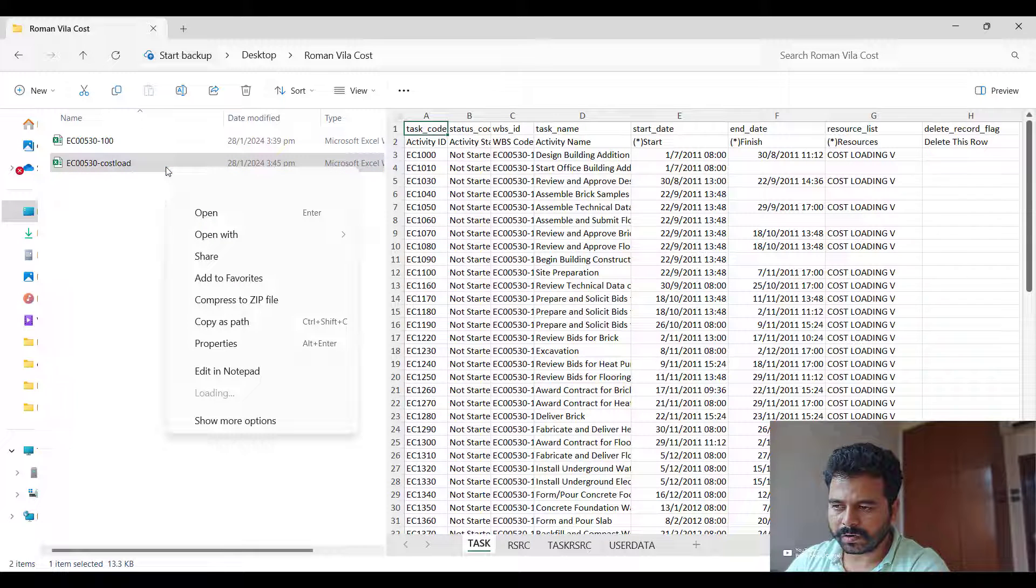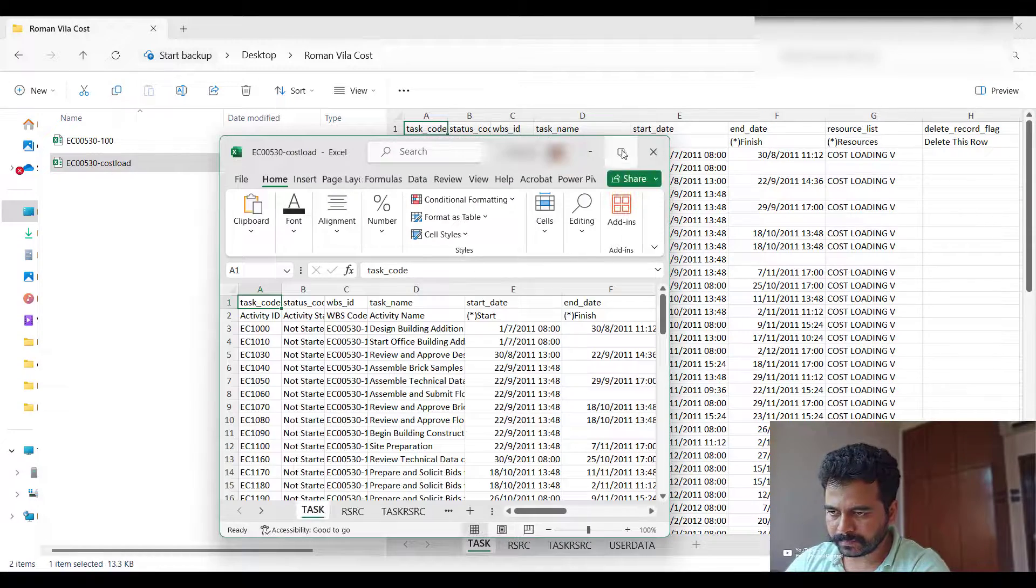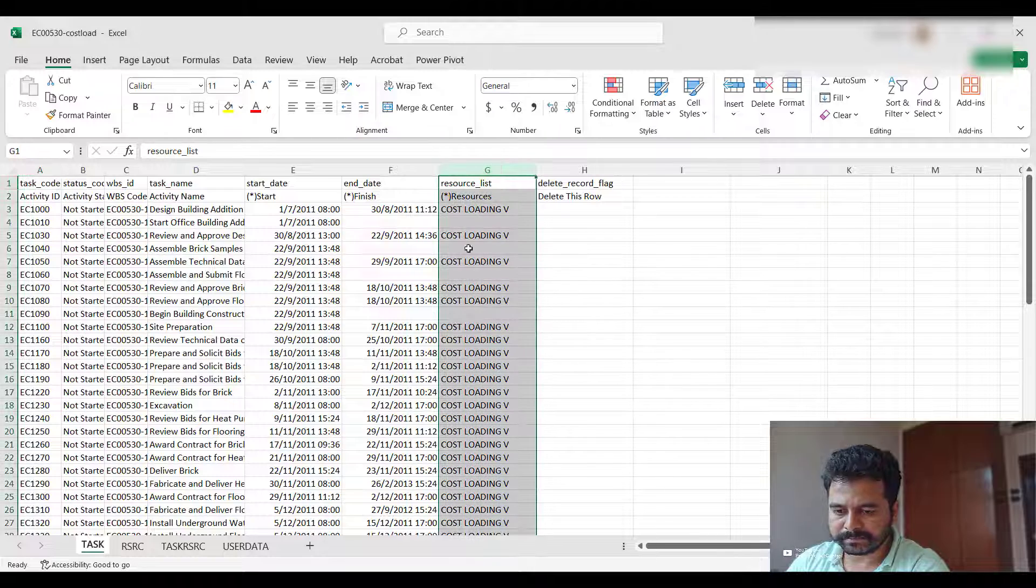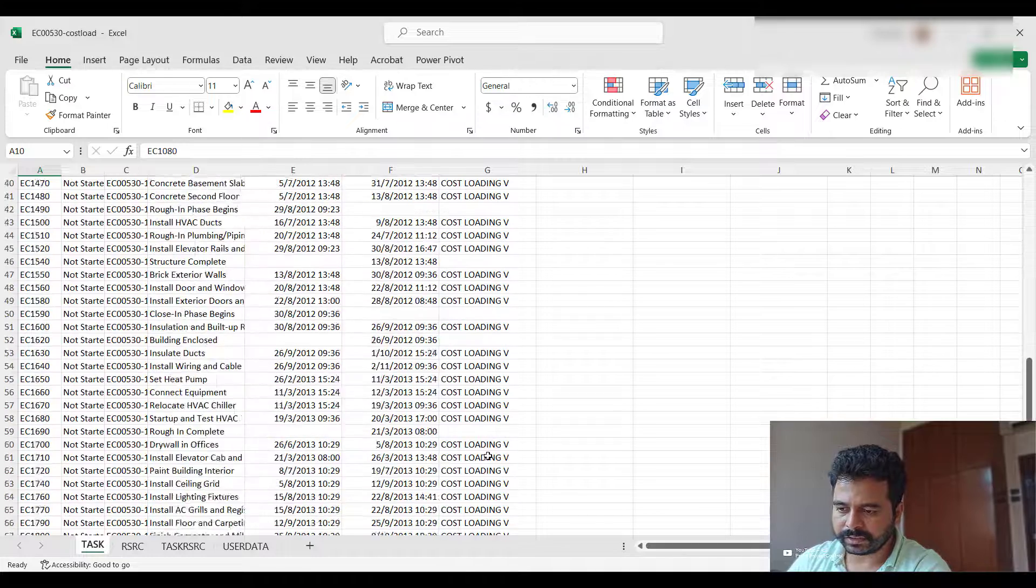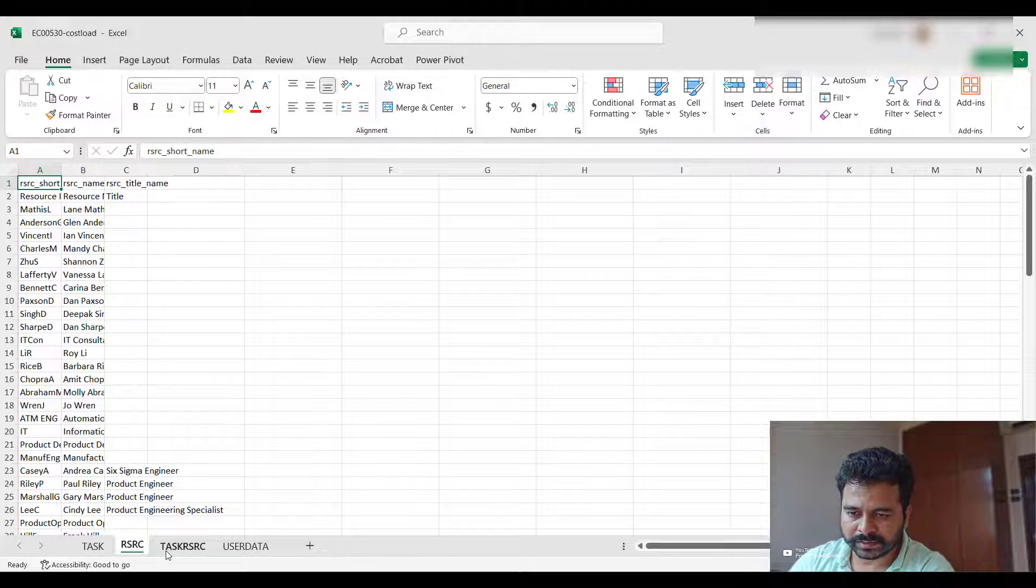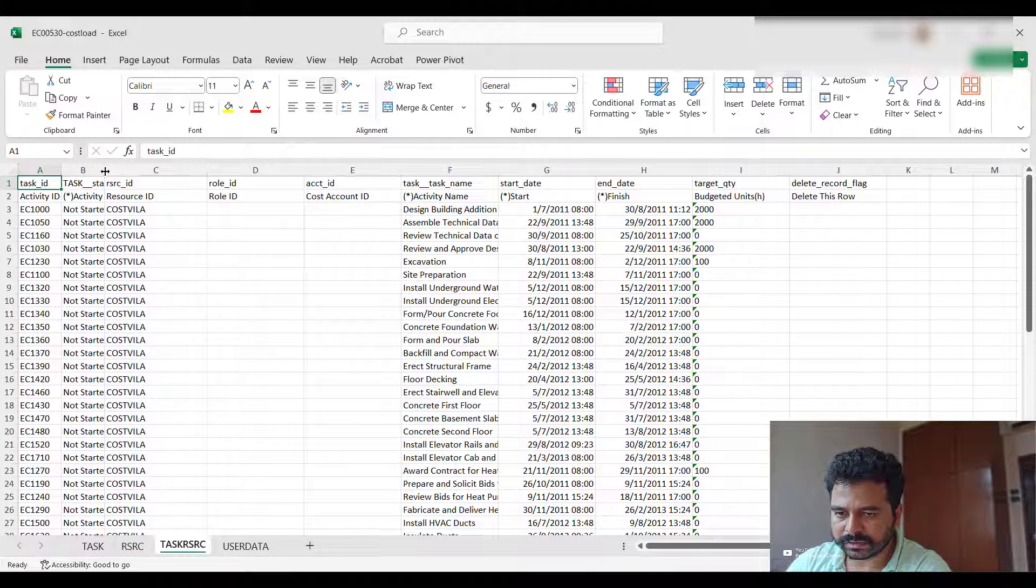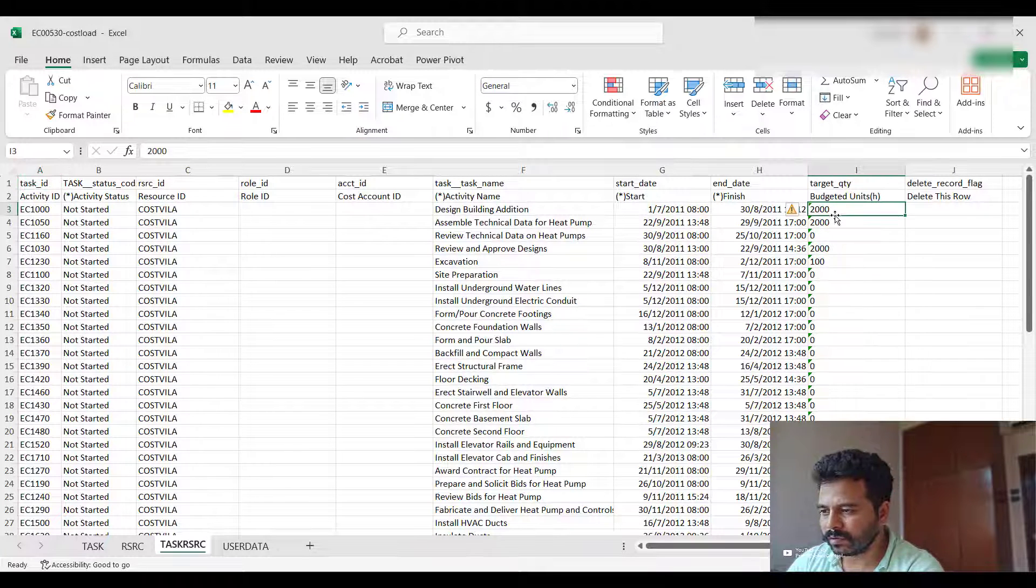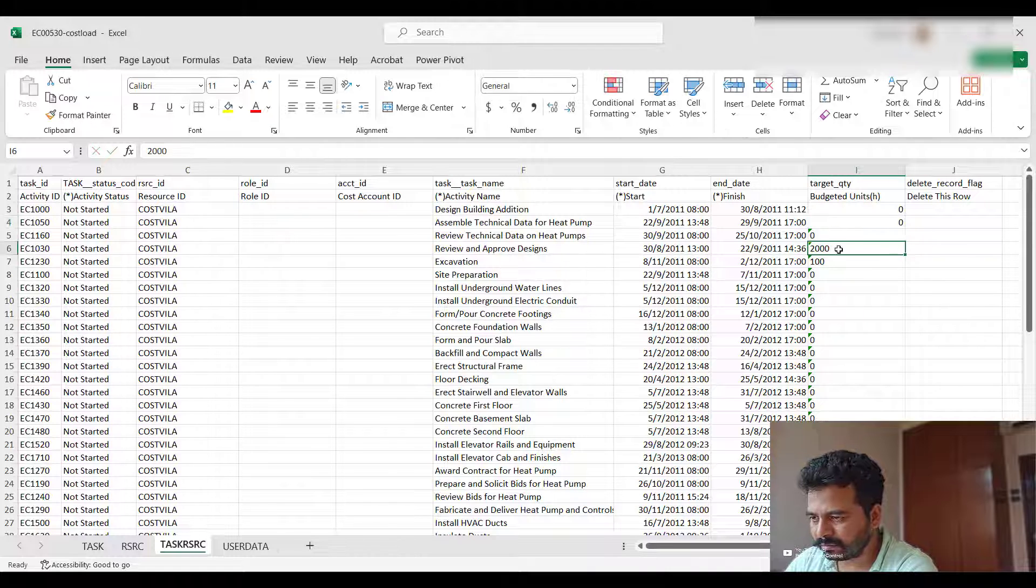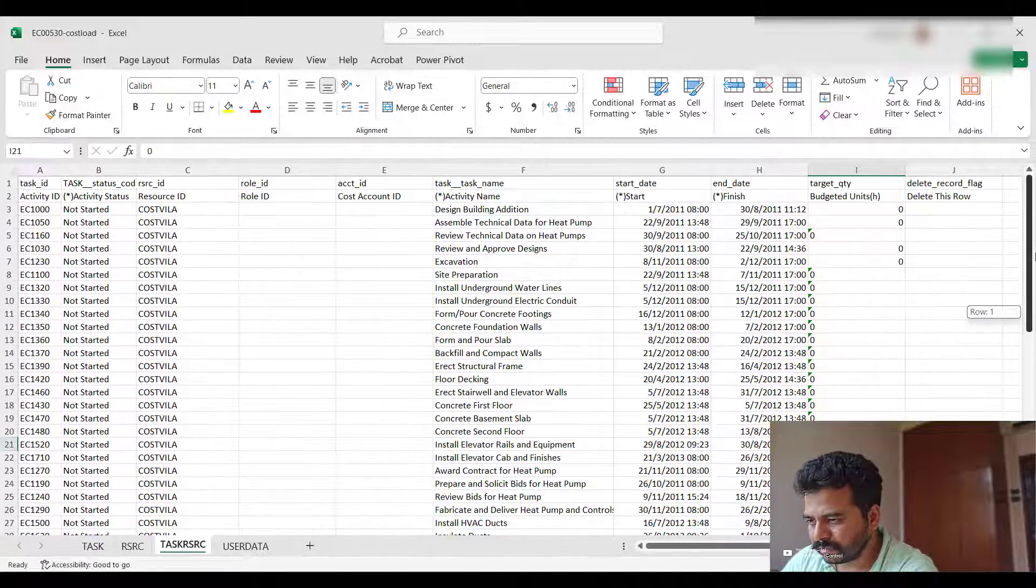Under Easy Cost Load, open this Excel file. You can see under Task, these activities and activity IDs showing resources 'Cost Loaded'. This is with only resource name and ID. So we'll go to Resource Assignment, that is Task Resources. You have activity name, activity ID, and some cost. I'll make this cost zero now. So it's all zero now.